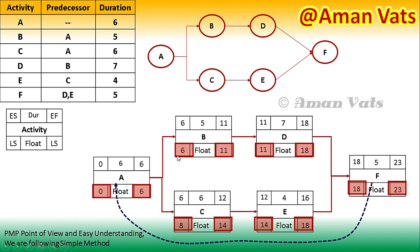This is a very important point to remember: when using the backward pass coming back, we use the least value. When using the forward pass going forward, we use the greatest value. If you recall, going forward from 18 and 16 we used 18. So we have now calculated our late start and late finish using the backward pass method.